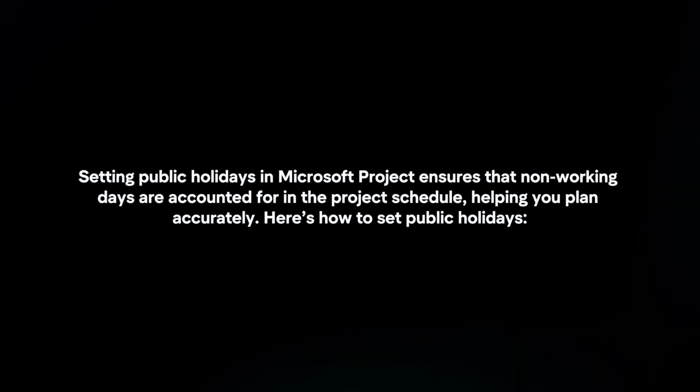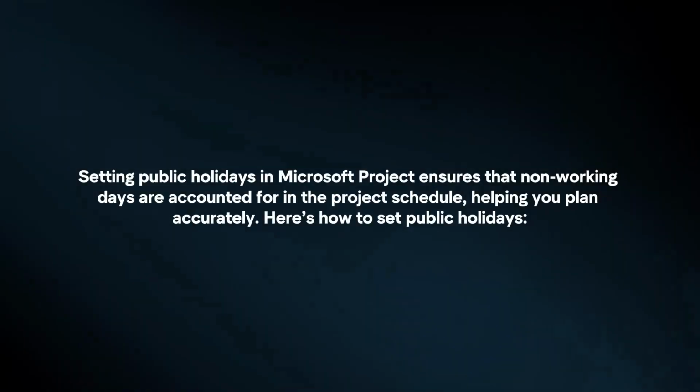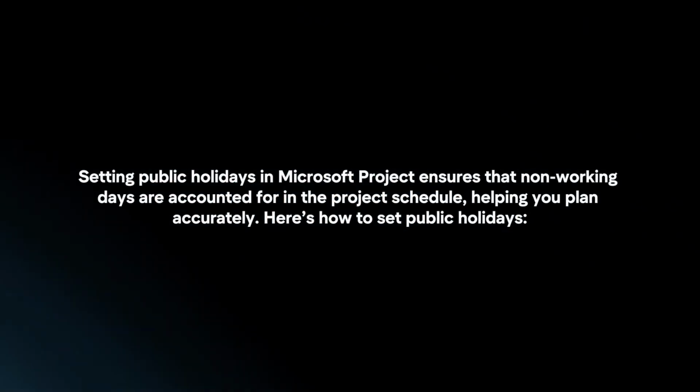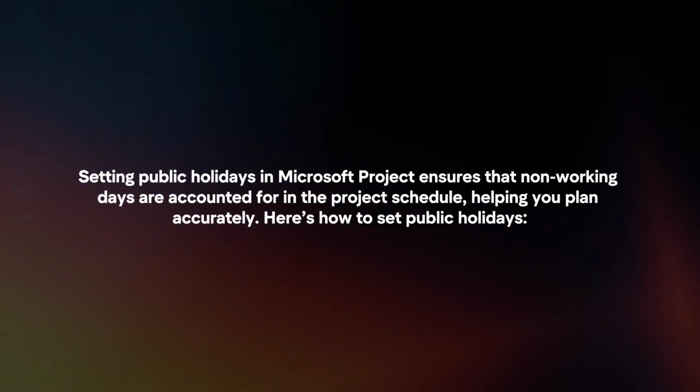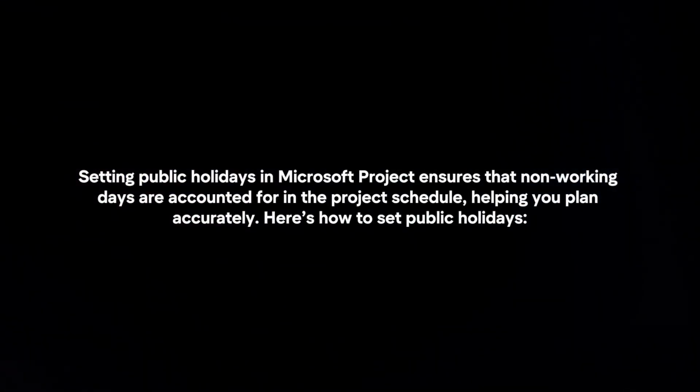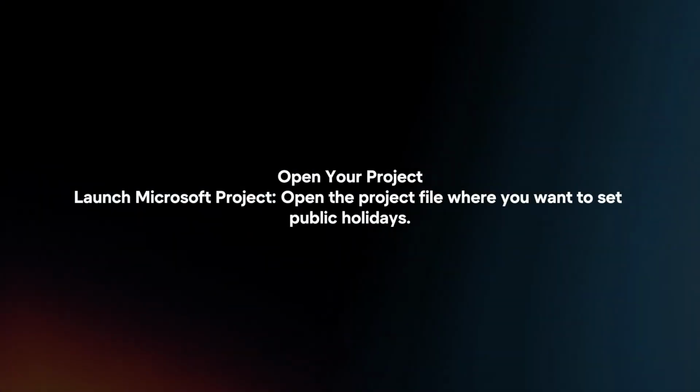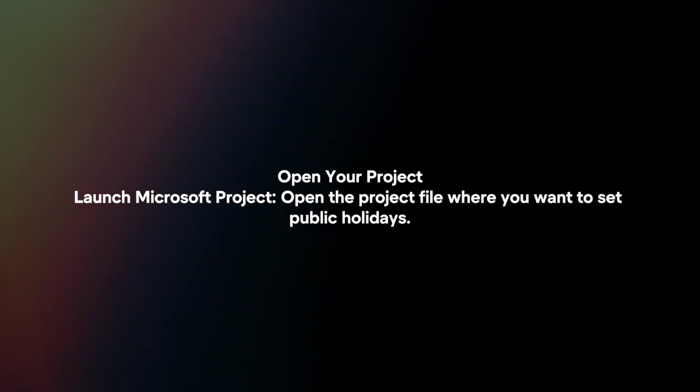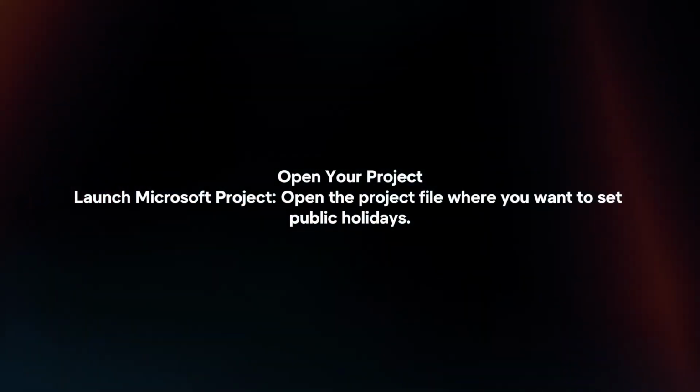Setting public holidays in Microsoft Project ensures that non-working days are accounted for in the project schedule, helping you plan accurately. Here's how to set public holidays. Open your project. Launch Microsoft Project. Open the project file where you want to set public holidays.